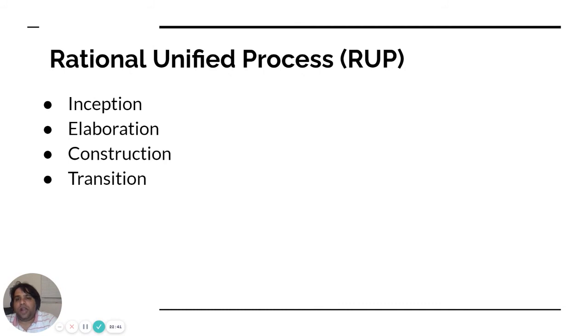You start working on designing in week 1 and week 2, then in week 2 you can start developing whatever week 1 design is available. We cannot say everything starts parallelly, but once one process has started, after a short time the second phase starts as per the schedule.